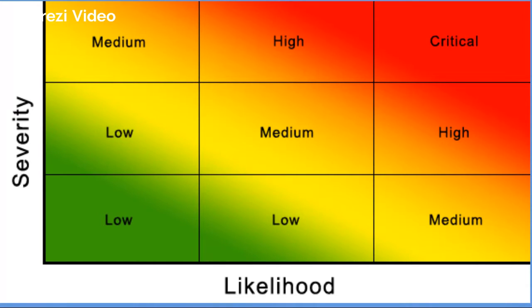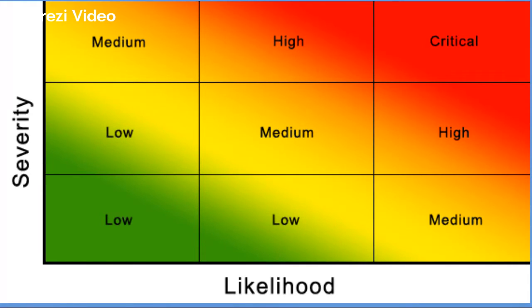Another small note: this grid is a 3x3. I could do an entire separate video on why I think a 3x3 grid is more appropriate than a 5x5 grid. But as a bonus point, make sure your matrices aren't greater than 5 — I've seen 9 and higher, and that's ridiculous. 5 is the maximum; 3x3 is actually better. But that's a sub-point and another video.